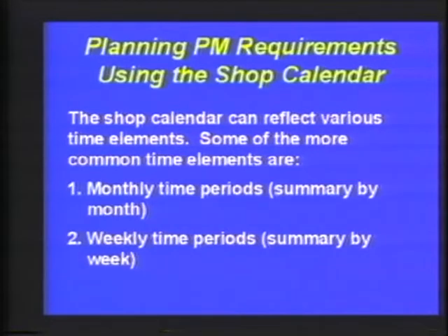I could therefore take that monthly time element and then break it down into the weekly time element, which is identified by step two. This provides the ability to look out into the future, place PM, major minor overhaul, planned requirements in larger time periods. We don't have to get involved in a detail relative to what day am I going to do that, or maybe what week am I going to do that. Right now, we're looking into larger time periods out into the future.